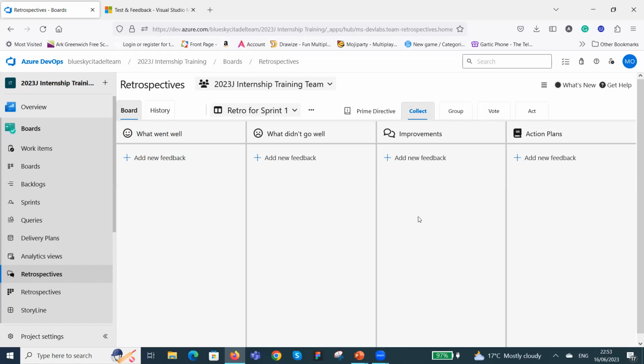So everybody starts using their votes. Oh, I vote that we should take this one in. I vote that. And then you might have one that has 10 votes, one that has 6 votes, and all that. Even after the voting, you as a team will still deliberate: we've picked this one with 10, but really, is it the priority? I think this is a priority over that one. You deliberate again, and then you make a decision on what you want to action. Yeah, that's where you vote.